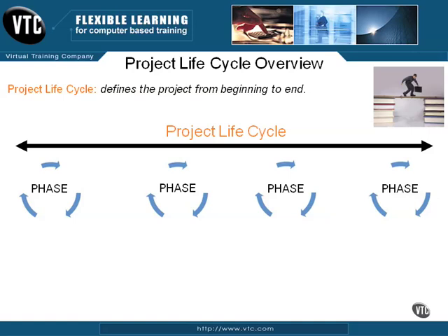For example, a software development project commonly has a requirements phase, design, development, testing, and also an implementation phase. Another common, more generic group of phases includes initiation, planning, executing, and closing phase. All the phases that you see on the screen together encompass the project life cycle. You'll often hear project management life cycle as well, which is the management of the actual project phases within a project. Let's look inside of a phase.